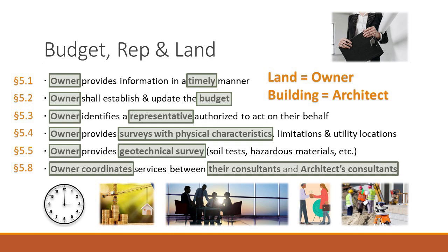And in fact, some of the obligations that the architect has to do is they have to go in and make sure that they're following codes and regulations and laws. And in order for them to do that properly, they have to have the survey information, and since they can't get it, the only party that can get it is the owner, so it's the responsibility of the owner to go out and get the surveys.